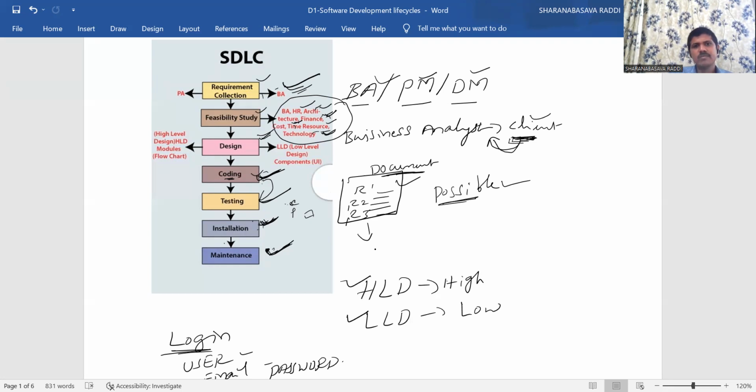If they face any problem, we will take it as our issue and try to resolve or fix it, and again it will be tested, and we communicate that it has been resolved. This maintenance is for a specific period depending upon the agreement. It is not forever. For example, if we developed a project for 1 year and it got installed at the client's place, the maintenance might be around 1 month, or 4 weeks, or 2 weeks. It depends. Okay.